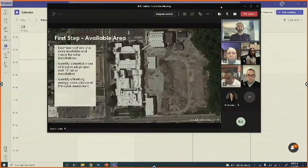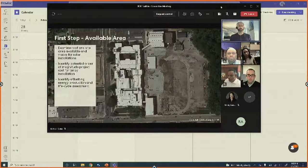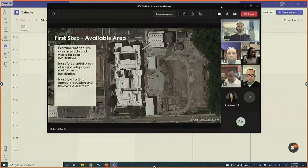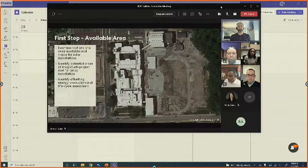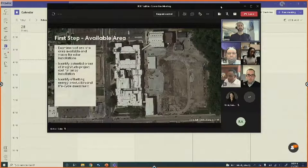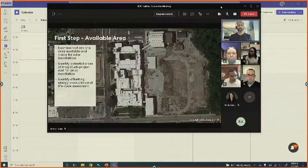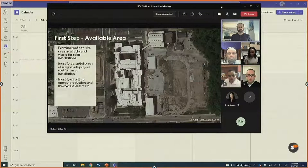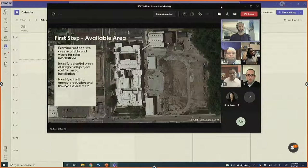The first step is to look at available area — where can solar panels be placed, on the roof or on the ground. We also need to study potential power generation: what is our aim, how many kilowatts are we looking to generate, and start to identify an order-of-magnitude estimate of the project costs for the array installation.